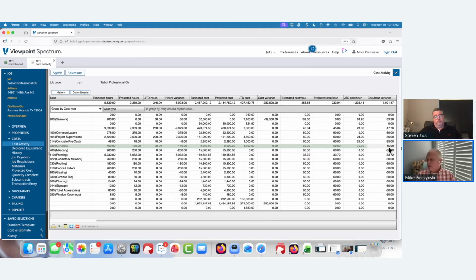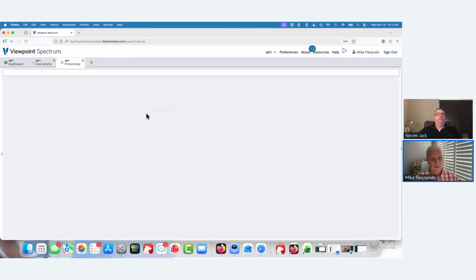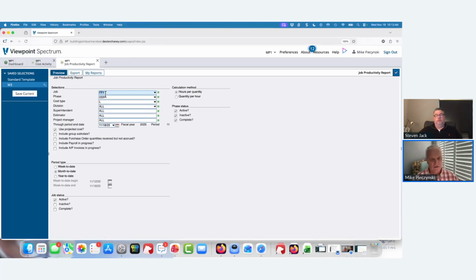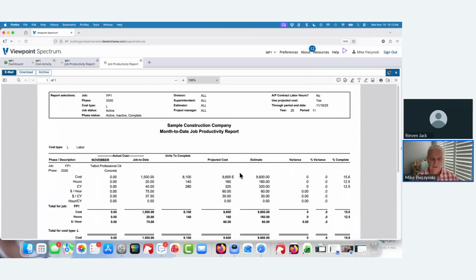And so my next question is, is there a productivity issue out there? Or is it potentially a cost issue? You don't know right now with what we're looking at. What a lot of people will do is they'll flip over to, in job cost, the productivity report. And I've used saved selections so I can zero in on concrete for this one job, and I'll just leave all of this the same. And honestly, if you do self-perform work, I don't know how your PMs would get by without this. So I'm on this job, Summit Professional Center. I'm looking at phase 0330 concrete work.